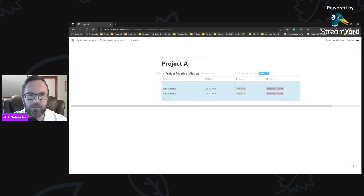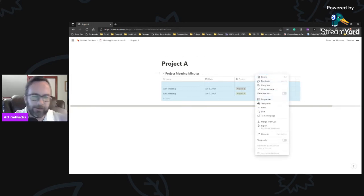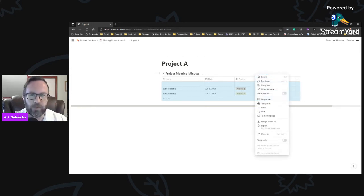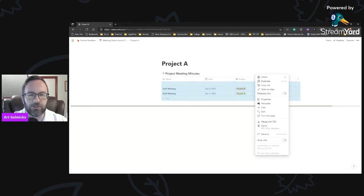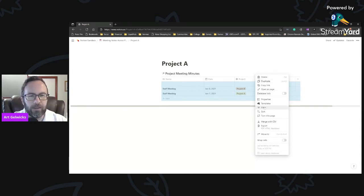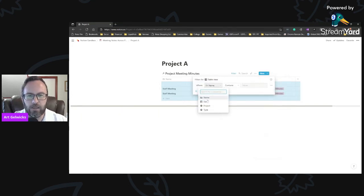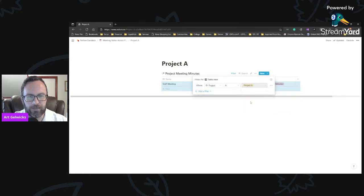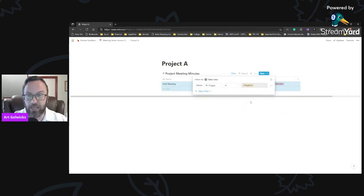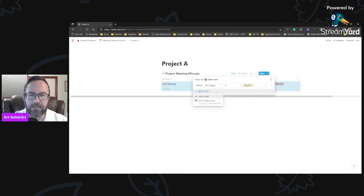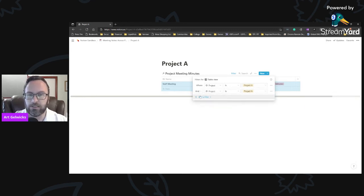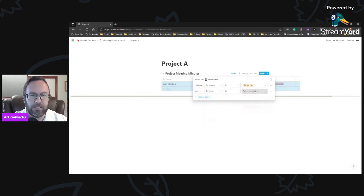And I'm going to misspell that all day long, aren't I? So we're going to select project meeting minutes. And sure enough, boom, there's my inline table. Now why I'm doing this is very simple, because now I'm going to apply two filters. You're probably saying, well wait, it makes sense, I should just apply one. Well I'm going to apply two and I'll show you why. The filter I'm going to apply is a two-step filter. The first part is to say when the project is project A. That makes logical sense, it matches the page. Therefore I'm getting project A's meeting minutes. The second one though may seem a little redundant, and it's going to be when the type is meeting minutes.